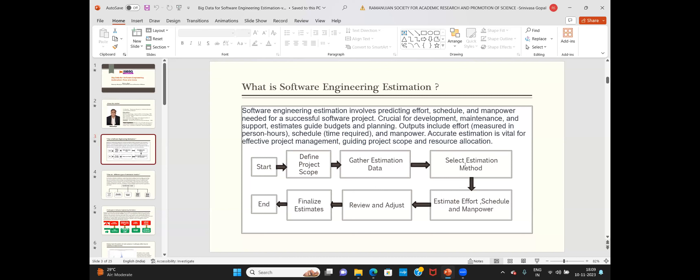Mostly you'll gather context-sensitive data that's relevant to your project and your organization. Then you'll select an estimation method — there are many estimation models, and you select one. Then you estimate and derive the outputs, namely effort, schedule, and manpower.